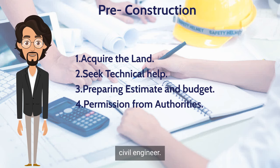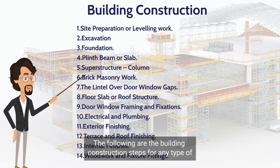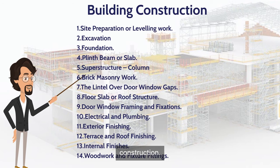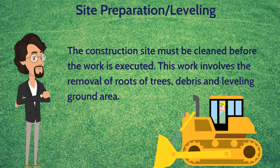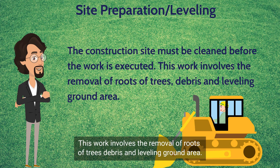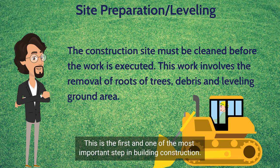The list of documents to be submitted to the authority includes: land survey, soil test report, land documents, elevation drawing, structural report, and certificate of the civil engineer. The construction site must be cleaned before work is executed. This involves the removal of roots of trees, debris, and leveling of the ground area. This is the first and one of the most important steps in building construction.